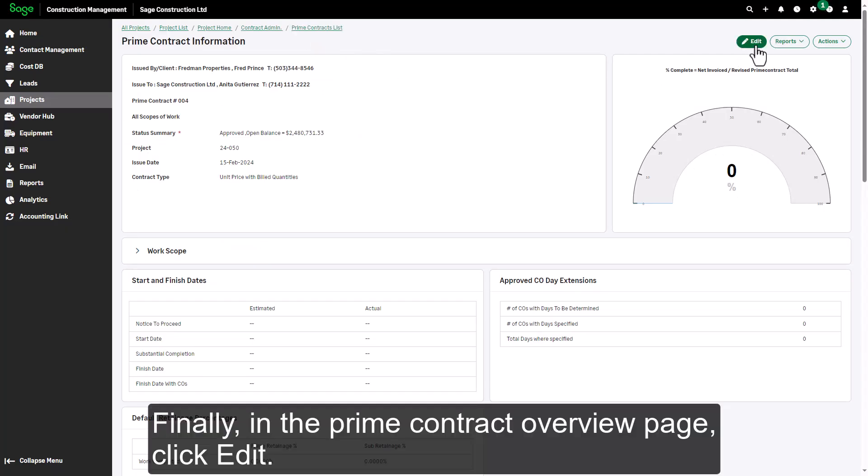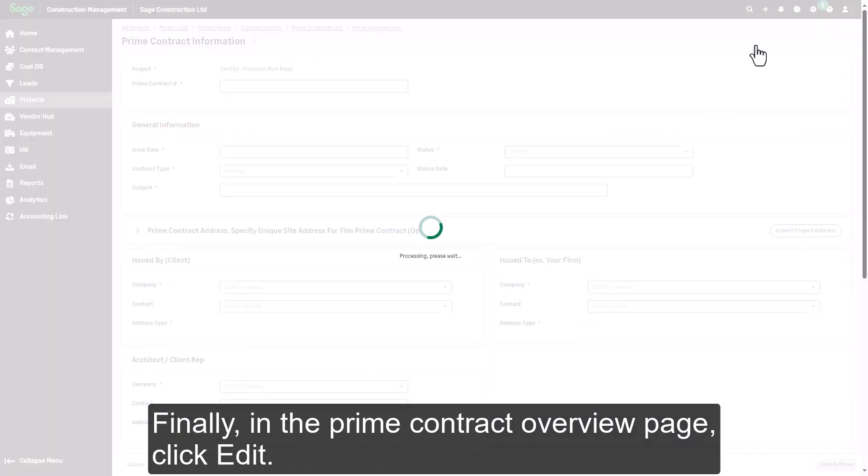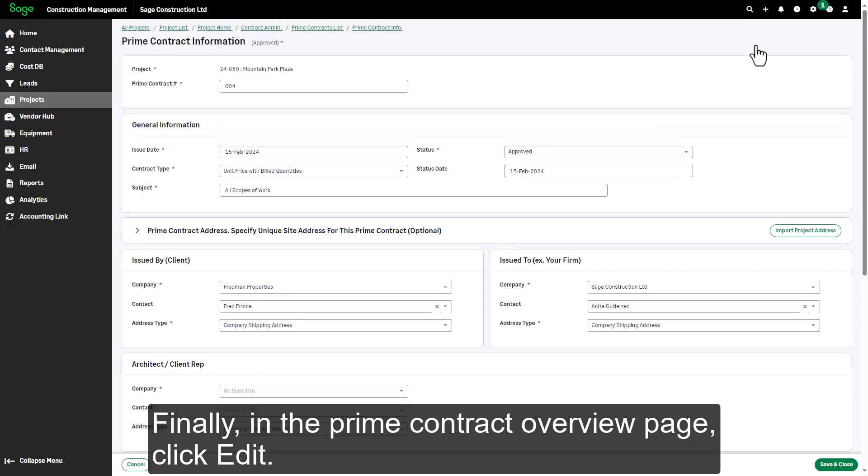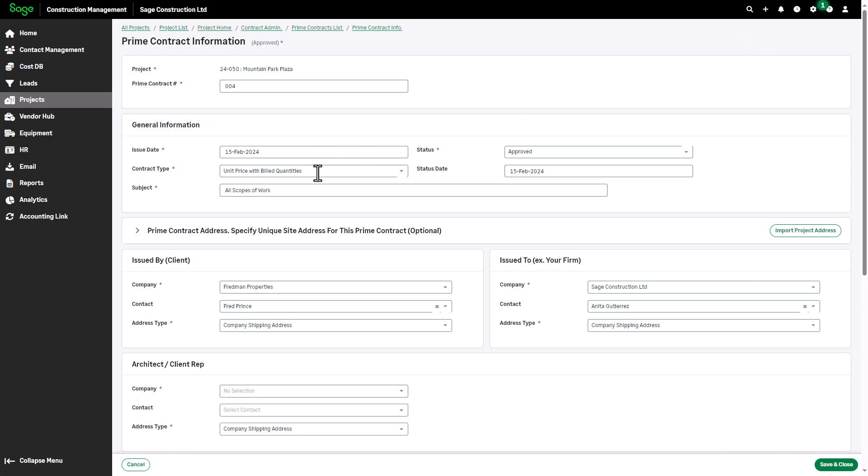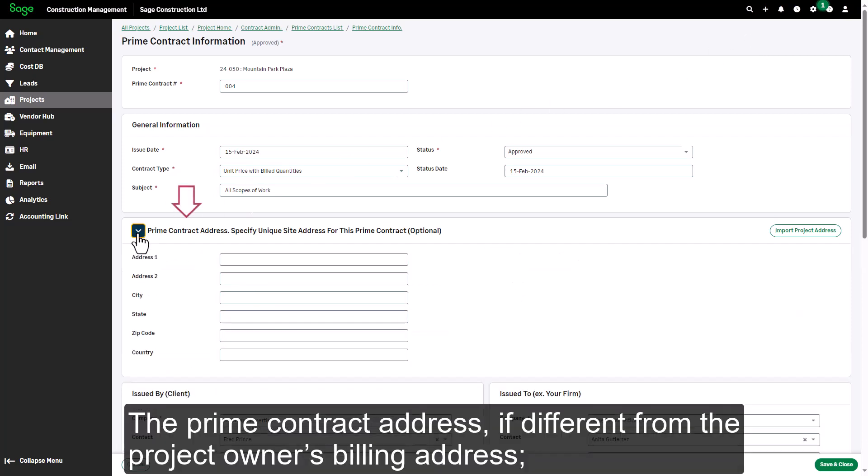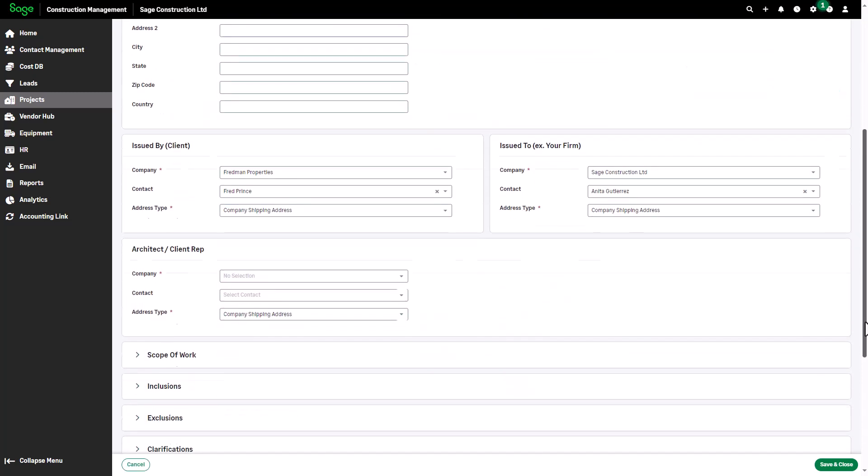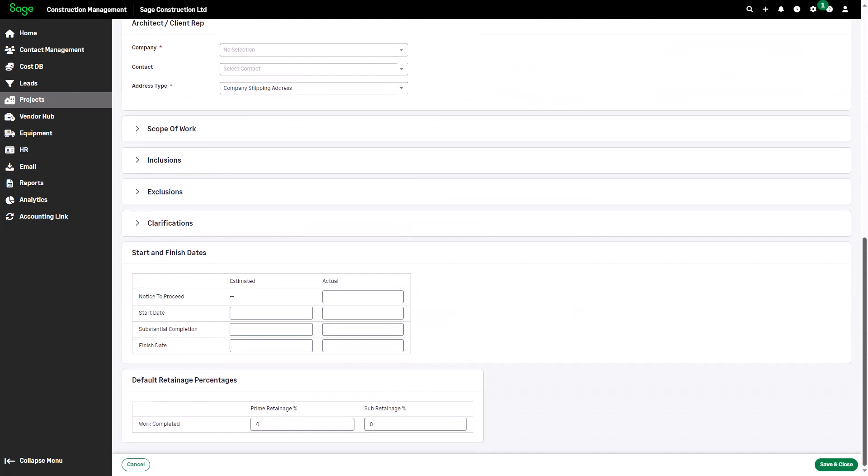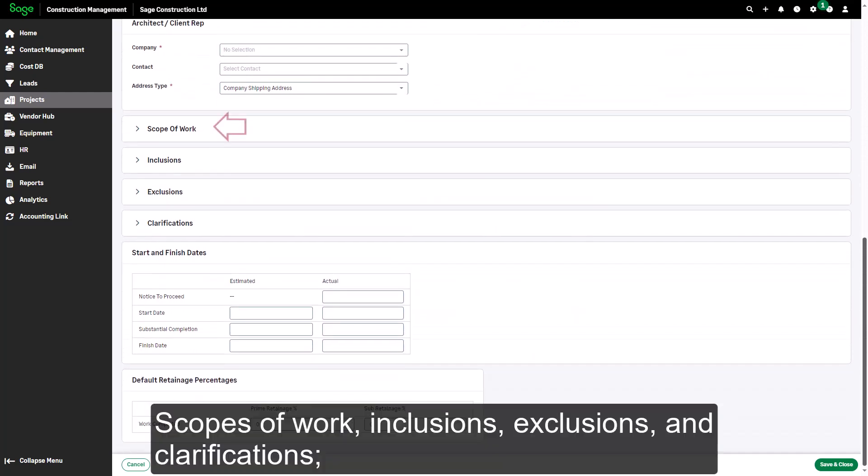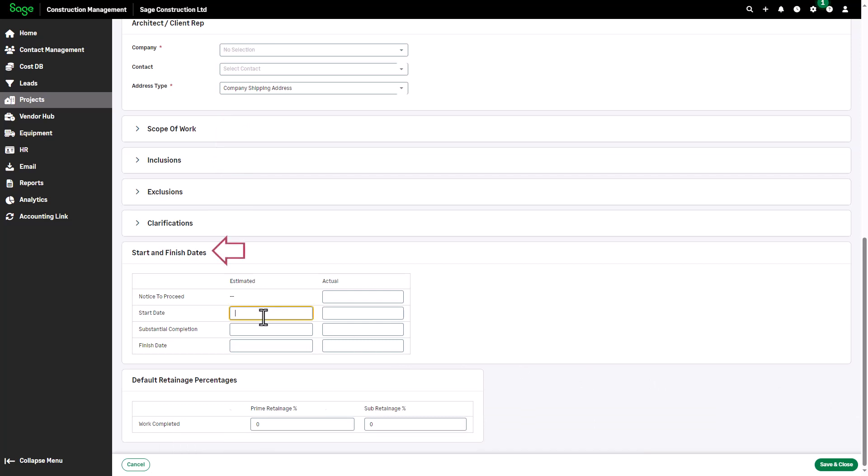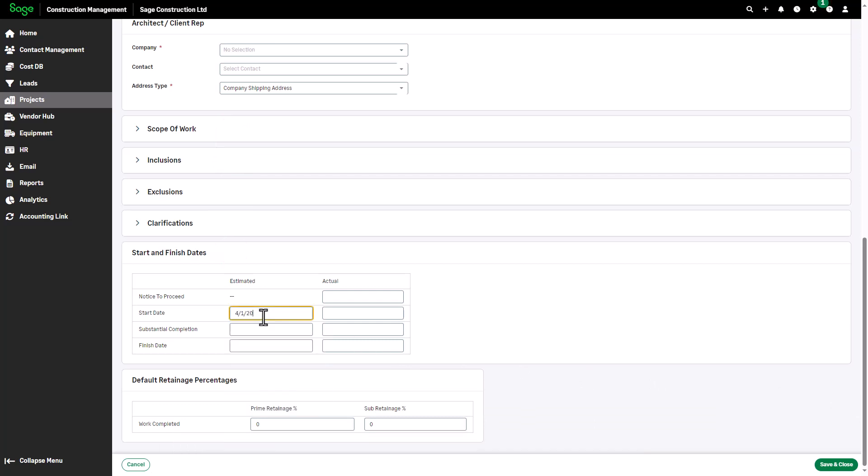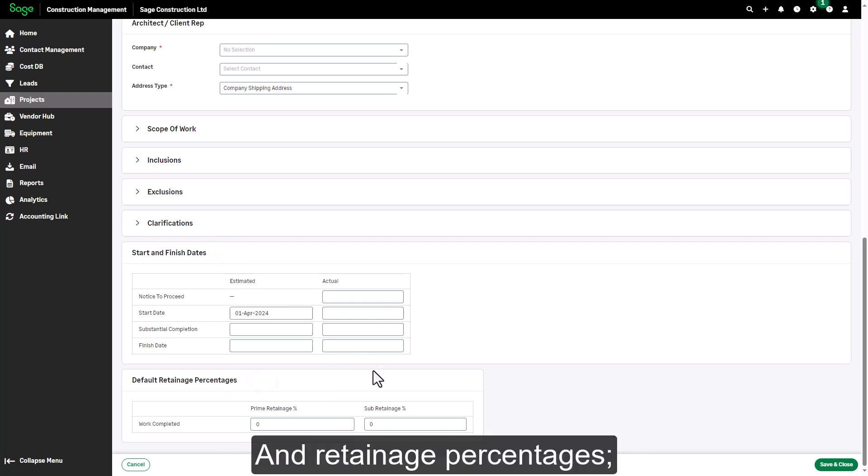Finally, in the Prime Contract Overview page, click Edit. Remember to enter information for the areas that aren't handled during the wizard, the Prime Contract Address, if different from the project owner's billing address, scopes of work, inclusions, exclusions, and clarifications, estimated start and finish dates, and retainage percentages.